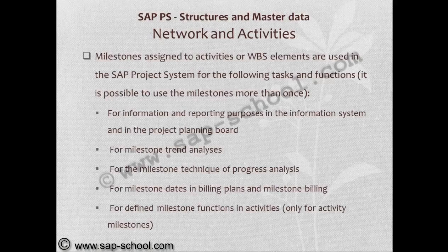Milestones assigned to activities or WBS elements are used in SAP Project System for the following tasks and functions. For information and reporting purposes in the information system and in the project planning board. For milestone trend analysis. For the milestone technique of progressive analysis. For milestone dates in billing plans and milestone billing. For defined milestone functions in activities.